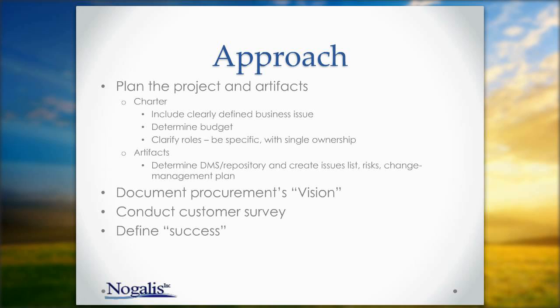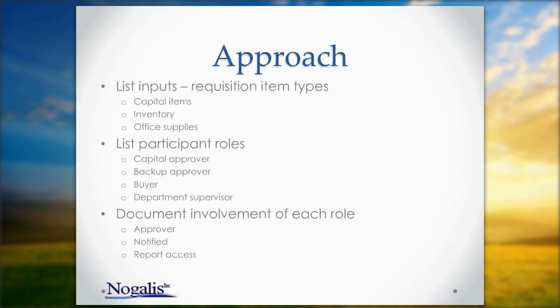Discuss doing a customer satisfaction survey beforehand. Have users in procurement and IT discuss the business issues with the current process. Ask procurement owners and stakeholders for their vision. Keep it system agnostic, meaning leave the word Lawson out of the conversation. If this is detailed enough, portions of it may be able to serve as requirements. During that discussion, discuss lessons learned in previous projects and make sure to check back to this list during your implementation.